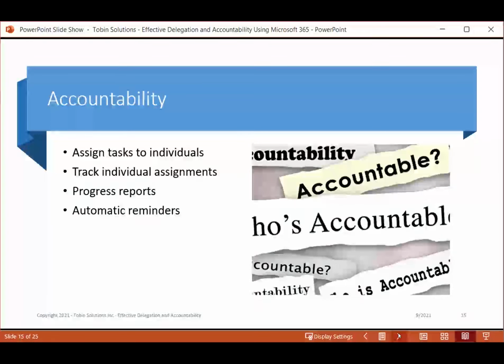Accountability. So, what is accountability? That is someone's agreed to do something a particular way by a particular date. That's kind of the fundamental thing. I will send out the invitation to the party by this Friday at 5 p.m. Okay, you have a very clear idea of what the task is, who's going to do it, and by when.